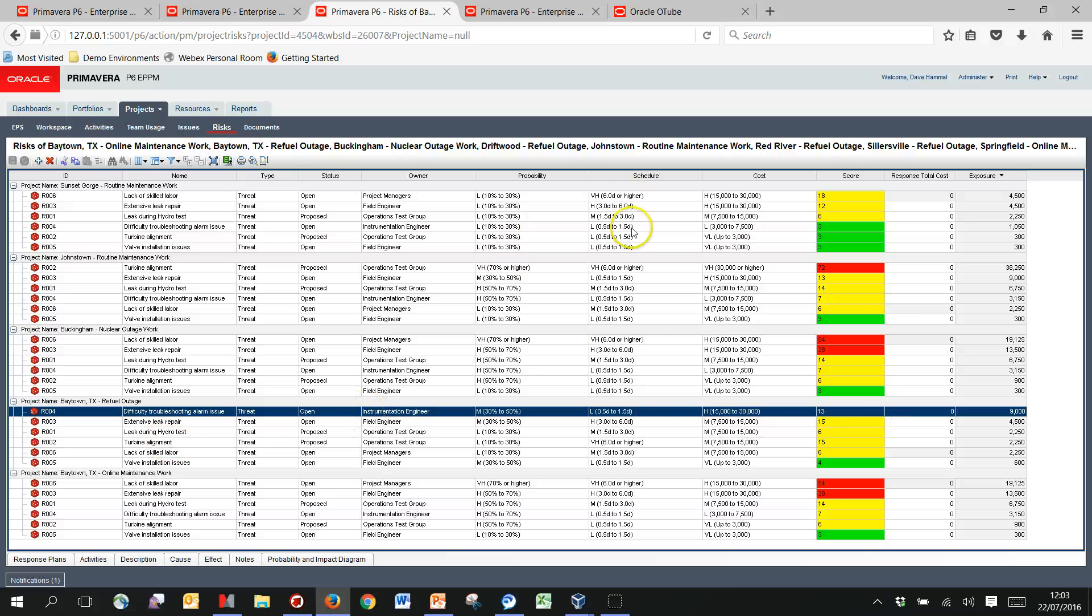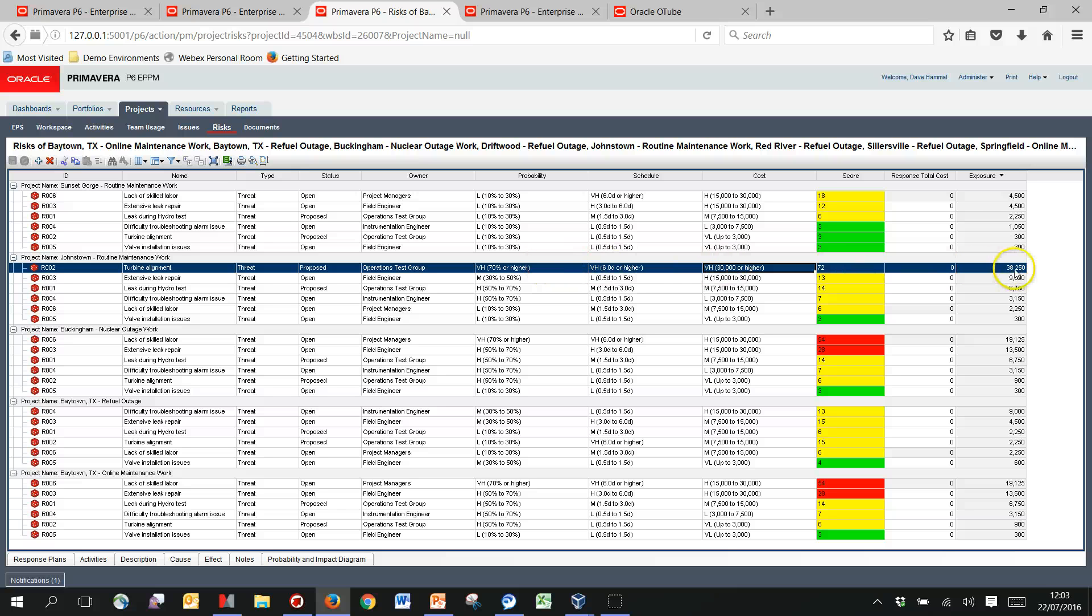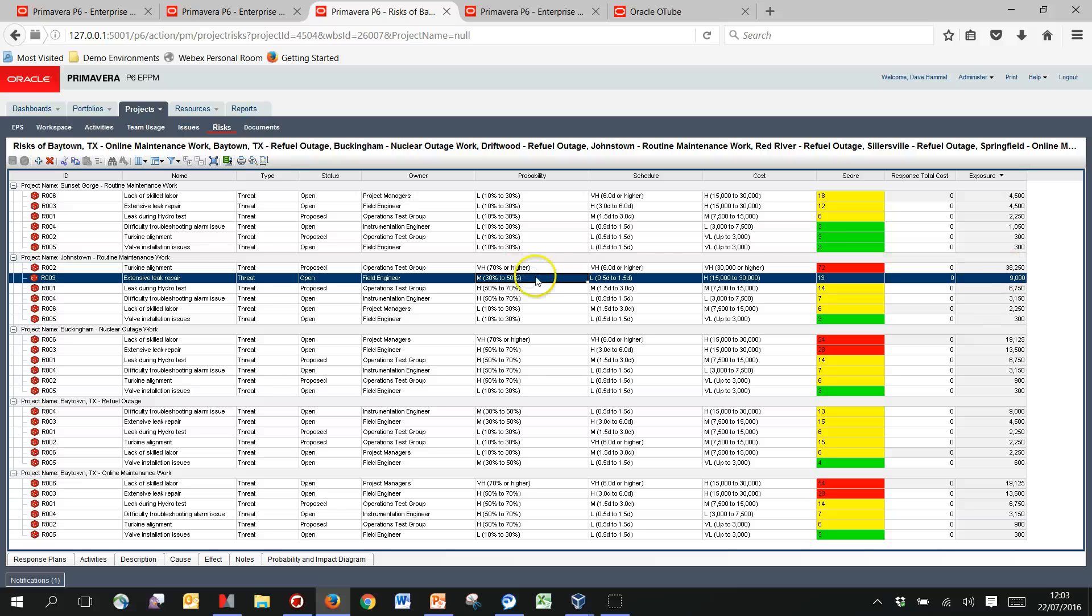So just to clarify, pick one of the larger numbers in here so we can see within the Johnstown project, we've got risk number two which has got a very high probability and a very high cost. We basically multiply these two values together so we get a weighted cost value to get the 30 or 250, maybe slightly easier to see on a number that's not got higher on it. If we take the middle of the probability here, 40%, multiply by the middle of this point, so the middle of 15 and 30 is 22 and a half.